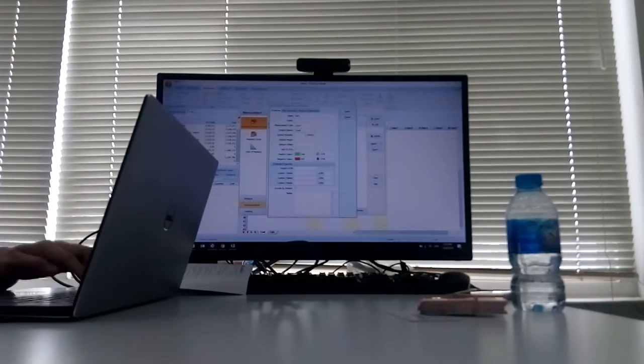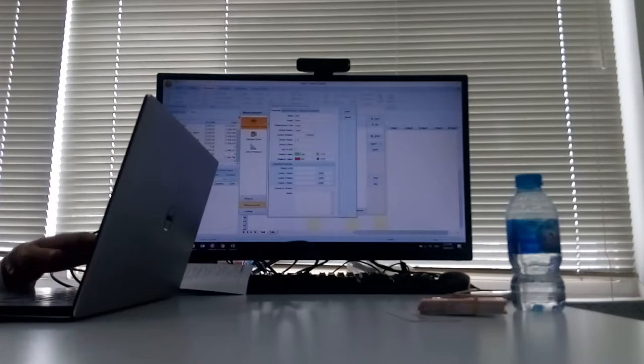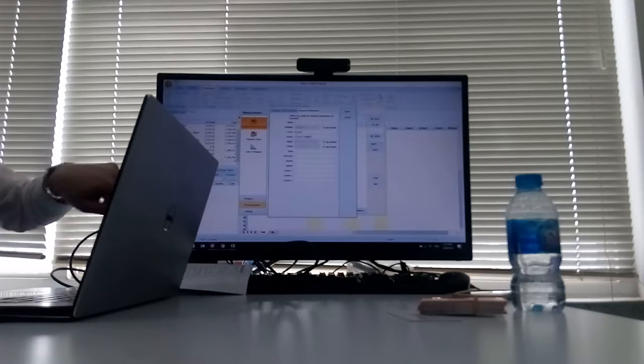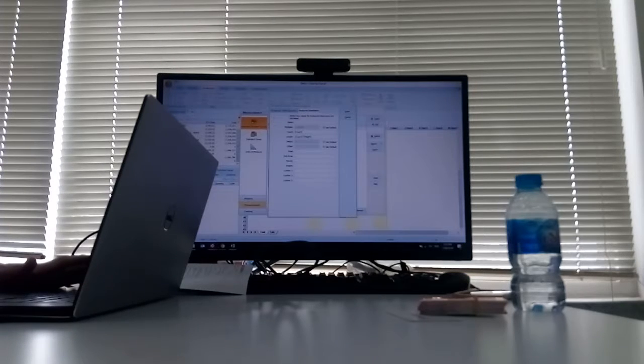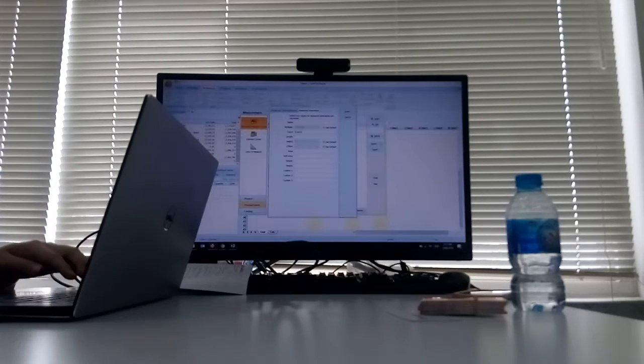Normally we measure like this one by count, so this one is under doors, the height of the door. Here you would have any detail of the basic measured dimensions: a length, an area, and so on. This one is a door, so there's a length, there's an area, and this one I put for area. I don't put the 2.2 multiplied into the CostX; the first one is 0.7, and we get 2.2.